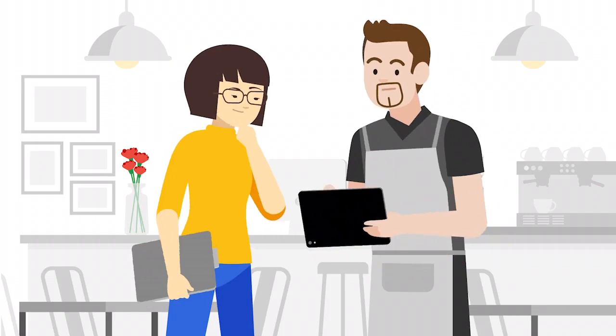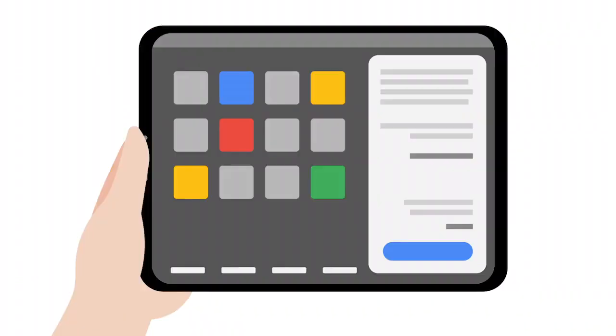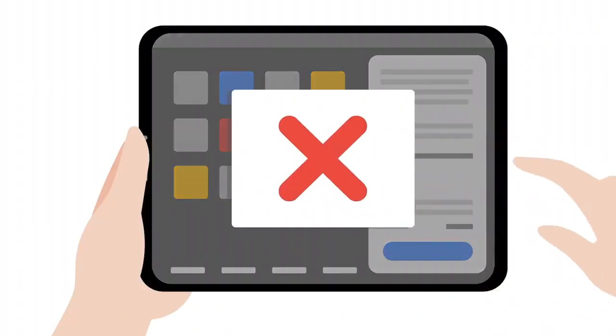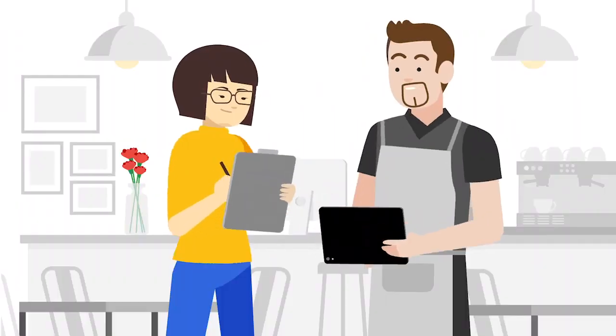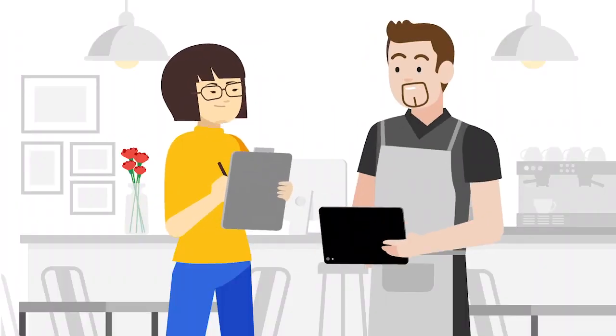It could be that the staff had a hard time learning how to use the tablets because the touchscreens kept malfunctioning, in which case you need to assess whether or not to continue with the original launch date. You also need to make sure that the project is not creating any unintended problems, either for the organization, your team, or anyone else impacted by the project's existence. For example, you'll need to assess when the best time for tablet installation is. If you schedule tablet installation when the restaurant is open, that might create a negative dining experience for restaurant guests.